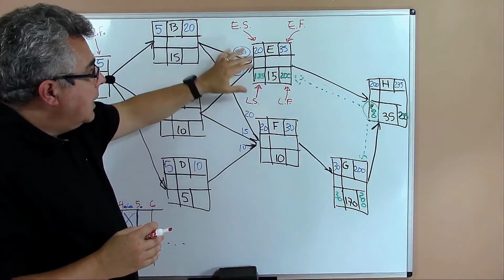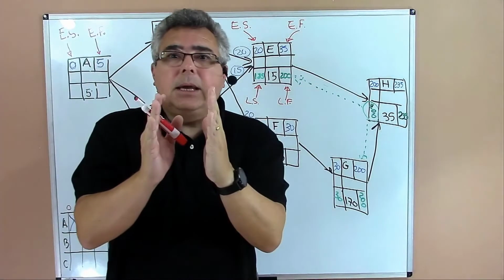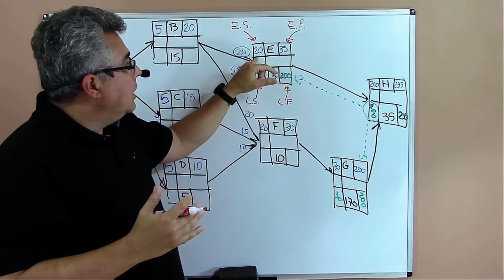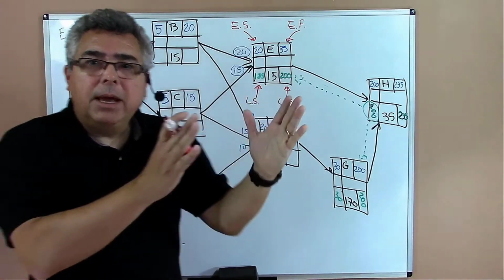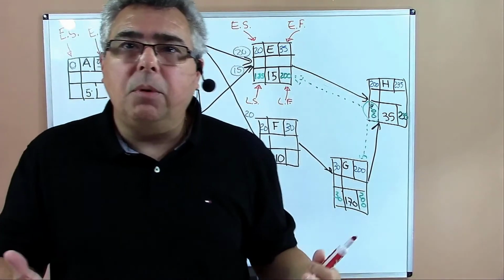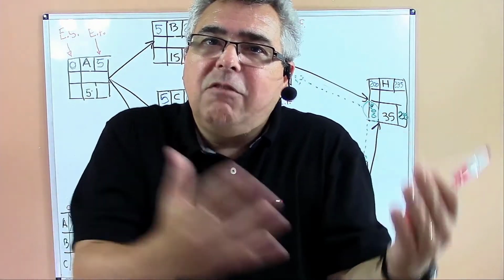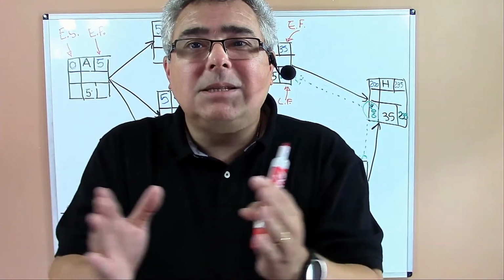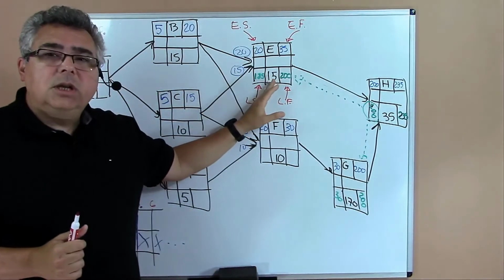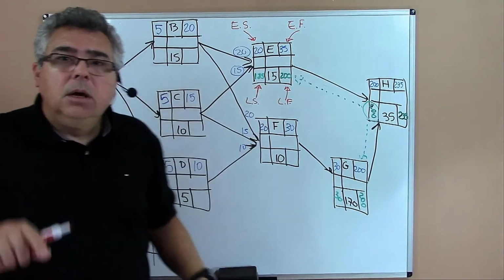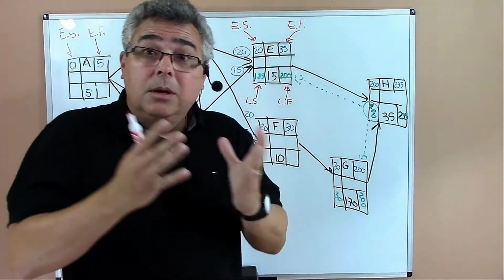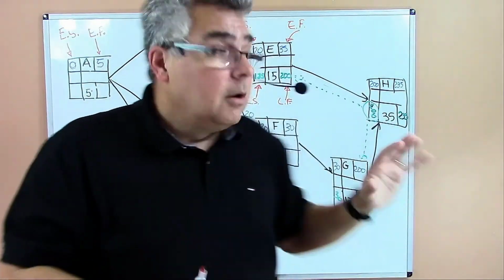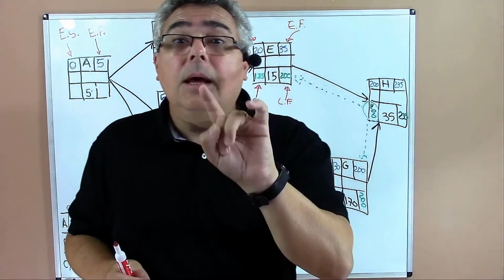So here, that task has a duration of 15 days. I can put that 15 days in the project schedule between day 20 and day 185, anytime. Sometimes the person is not available. Sometimes you don't have equipment available on a certain day, but just 5 days later. And so you have some flexibility to schedule the starting date of activity E. So the project manager, with that information, can try to figure out a better day to do a task. For task E, the project manager has flexibility.